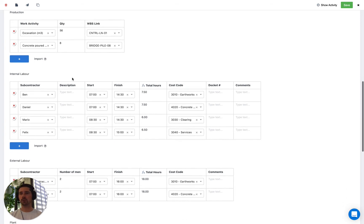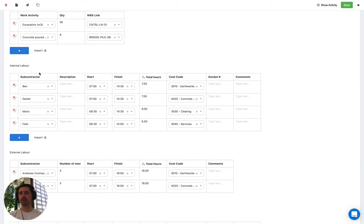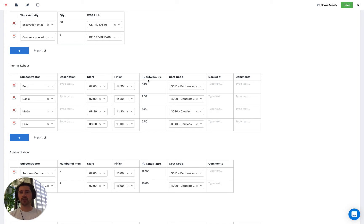We're also going to take a look at tracking labour. Here we have a table where we've got the names of people per subcontractor, and then we have the start and finish times for these people, and you can see the total hours that they've worked. We've got a formula column here which is calculating the difference between the start and finish time to give us our number for total hours. This is what our quantity chart is going to look at.